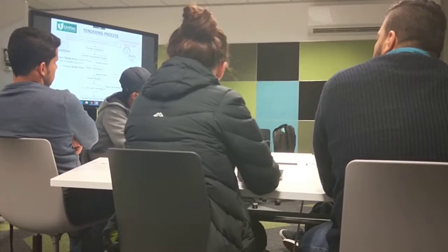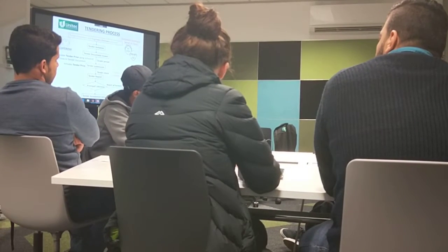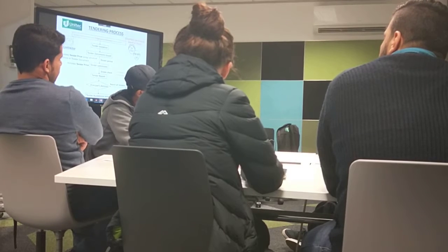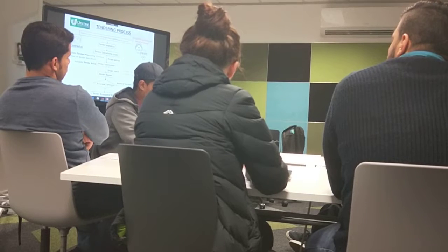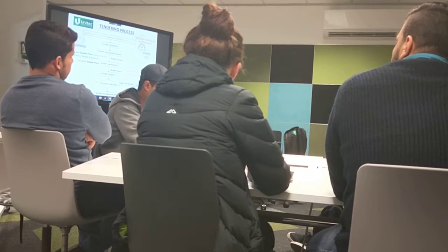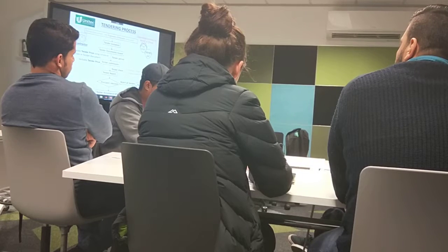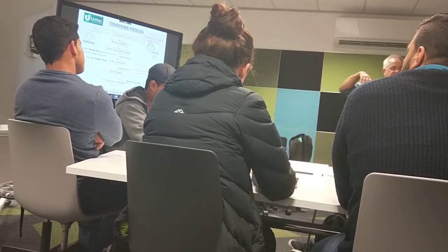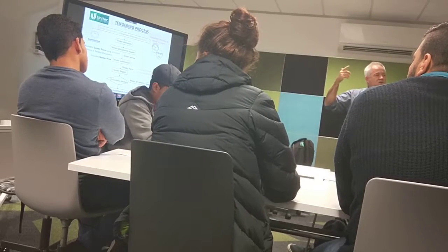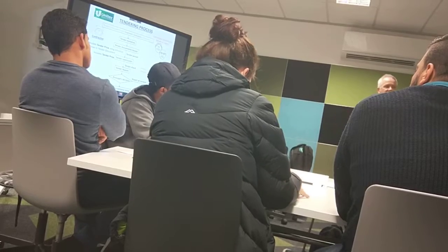Bills. Okay, they've misunderstood. You've done your schedule of quantity, you've done your estimate based on what you know because you're the designer. They've done theirs based on what you put in the tender documents. And sometimes what you think you've communicated in the drawings and the specifications is different from what the contractors interpreted. So if the prices all come in differently, too high or too low, then you need to investigate that. Why? Having it all broken down in the schedule helps you identify which bits are higher or lower than what you thought they'd be.